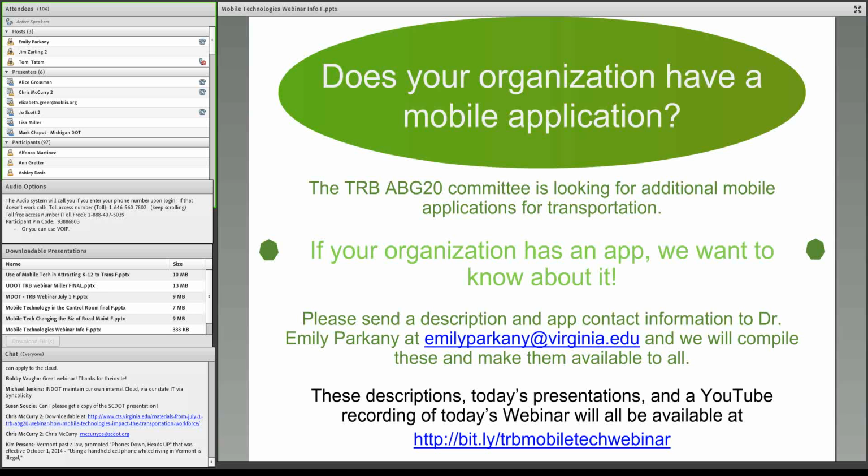And the lane closure app, the development was fairly quick. It was probably 8 weeks, but we did spend a significant amount of time building consensus within the agency before the app was launched. So when it was launched, it would be ready to use and people were familiar with it rather than just, here's a new tool to use, figure it out on your own. So there was quite a few years of back and forth consensus building before we launched it.